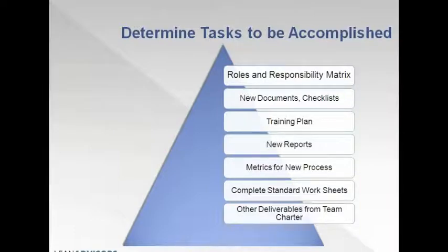Okay. All right. Other tasks to be delivered from the team. You know, as you go through and you do root cause analysis, you're going to come up with some things, and they're going to be things that go in parking lots. These are things that are, yeah, that's there, but it's a little out of the scope from what we're talking about. Let's put it over here so that as a team we move it forward to the next level and get it addressed by maybe another team or another group. Those are the things that we need to make sure are on our task list to complete.